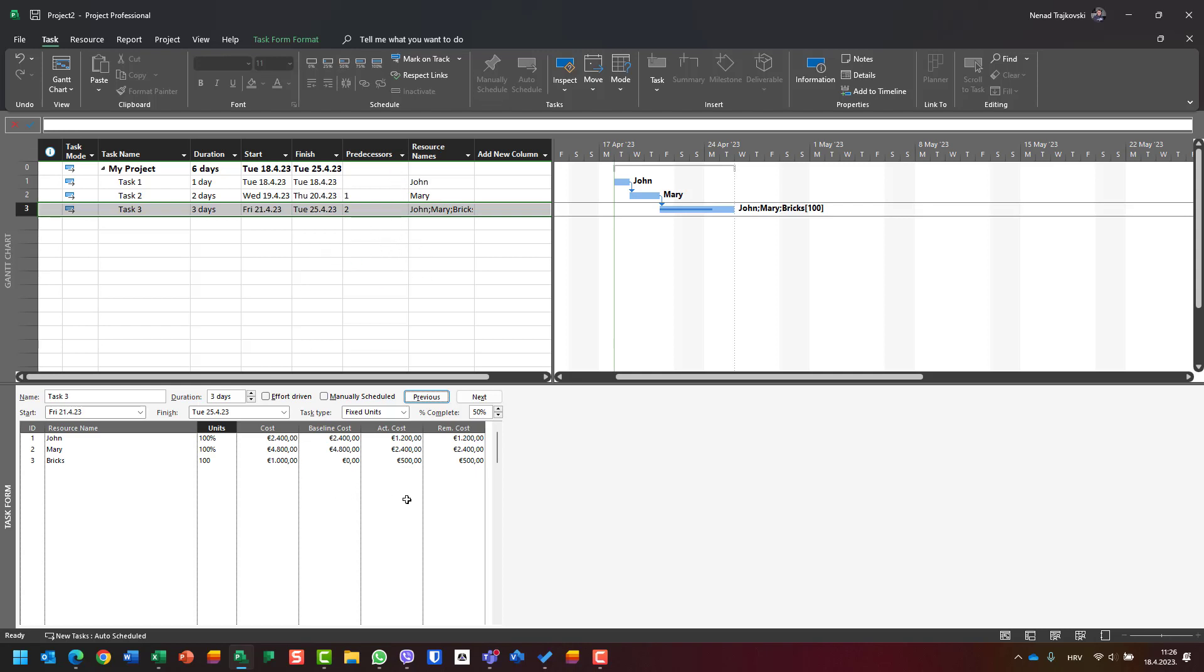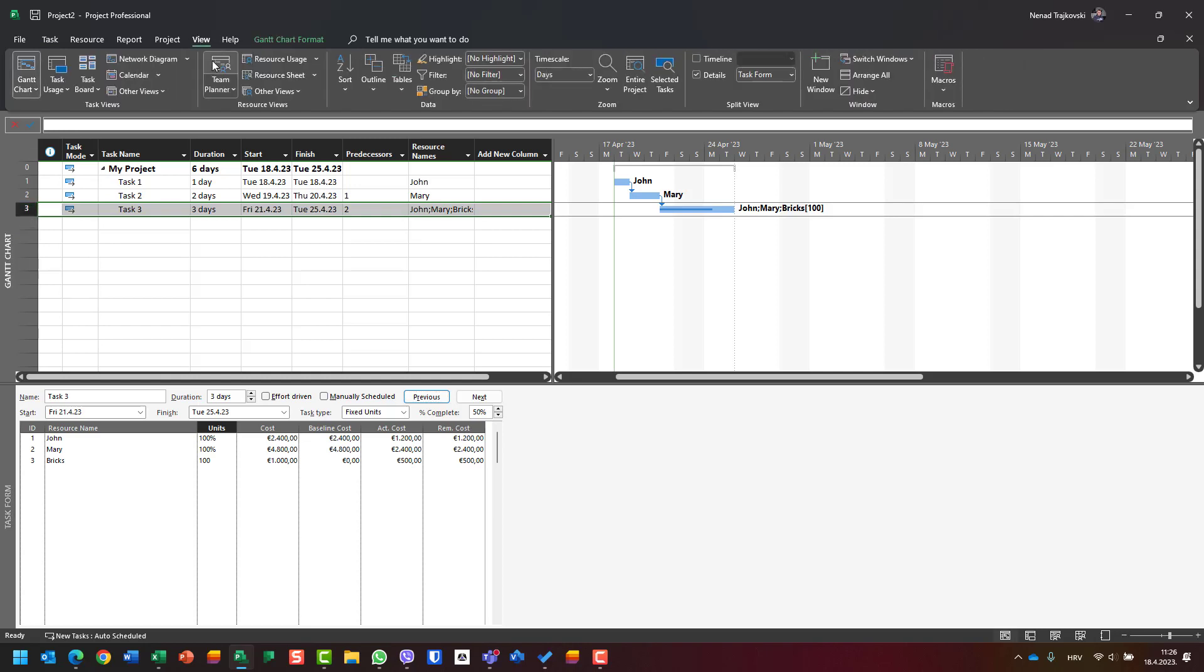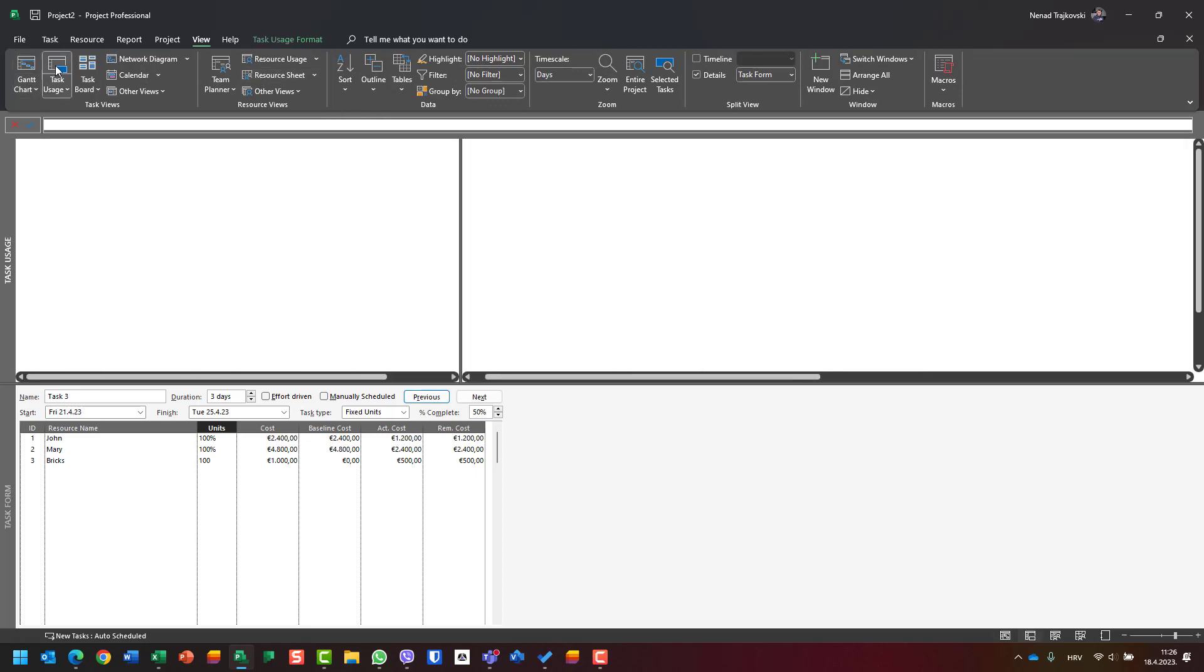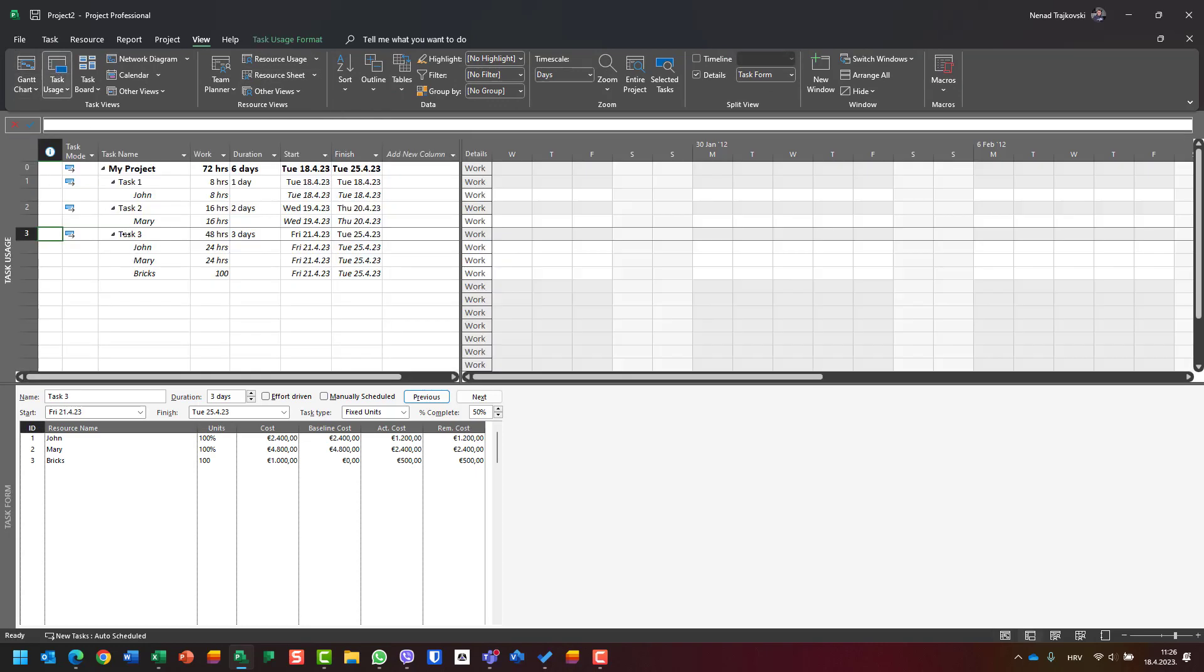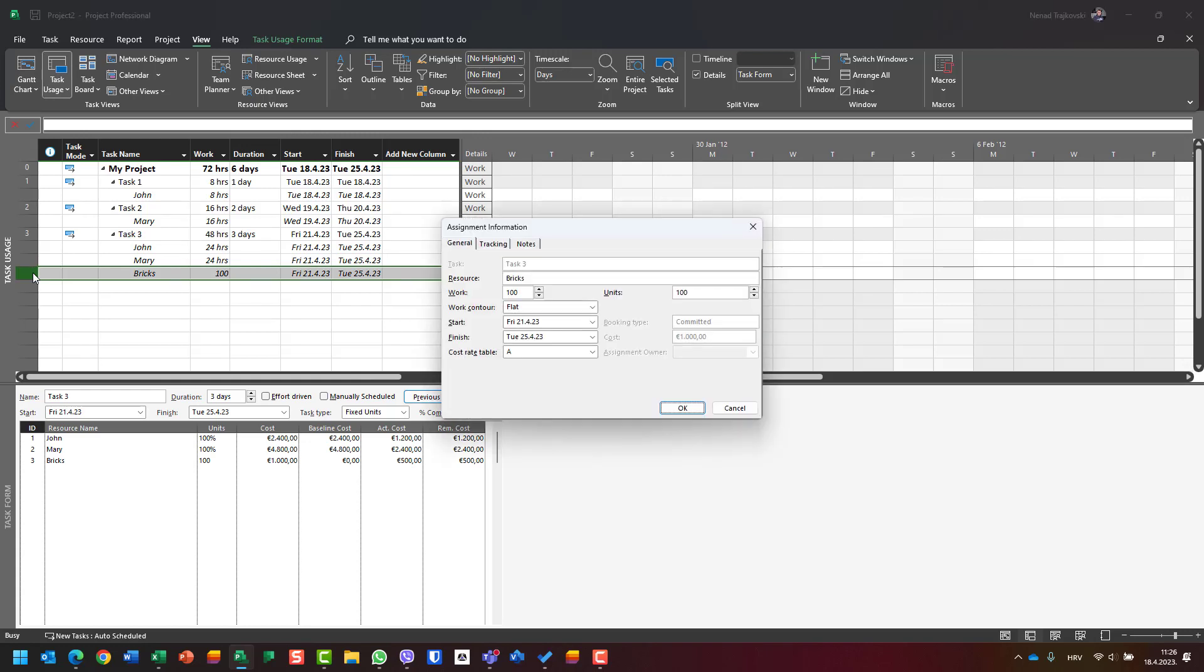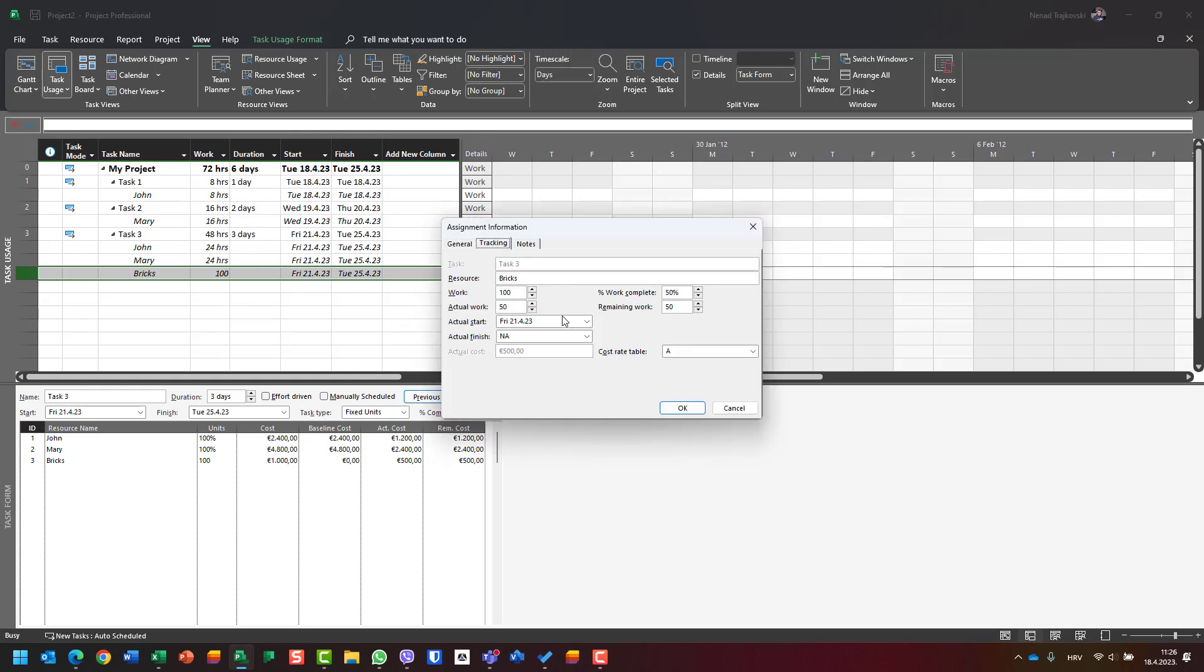I should say how many bricks I spent. I will track the actual bricks - let's say 50.